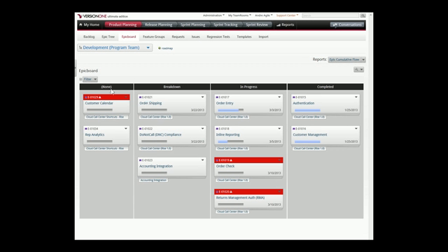So that's one way to look at it, you have release forecasting where you can start running what-if scenarios based on what you know. And like we discussed earlier around the MMFs and having that priority come into play, you also could, when you're looking at the estimate, start to include just your high priorities and say, how does that make our release plan look?